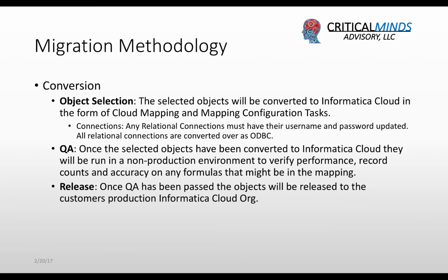because there could be a bunch of different business case scenarios where the business is very dependent on it. Your quarter end's coming up or your month end's coming up. So you might not want to migrate those right now and let the PowerCenter environment execute those month end jobs. Go ahead and migrate up the other workflows that aren't going to be as critical to the business unit. And then once that's done, you can go back and select those workflows and get those migrated up.